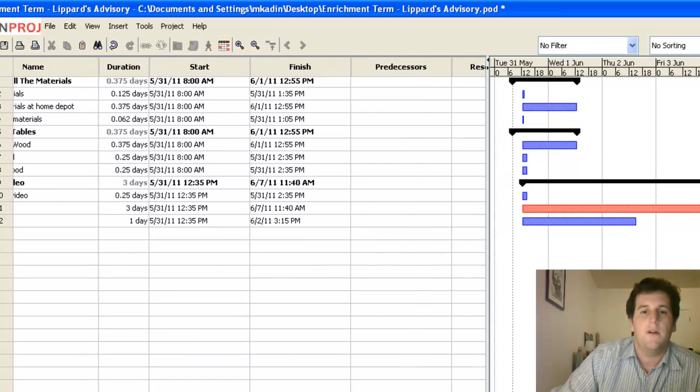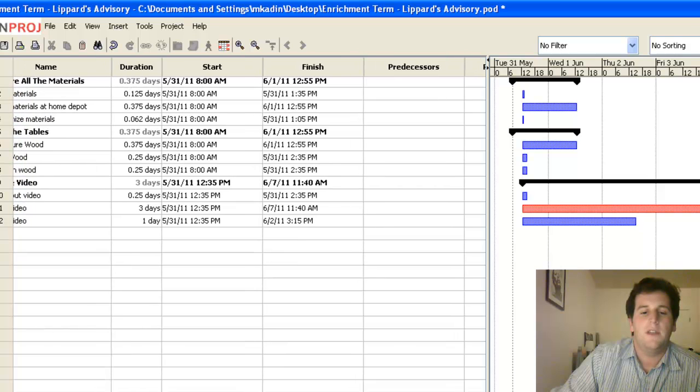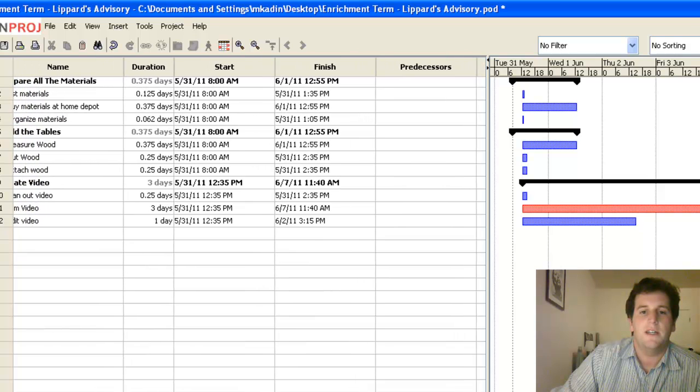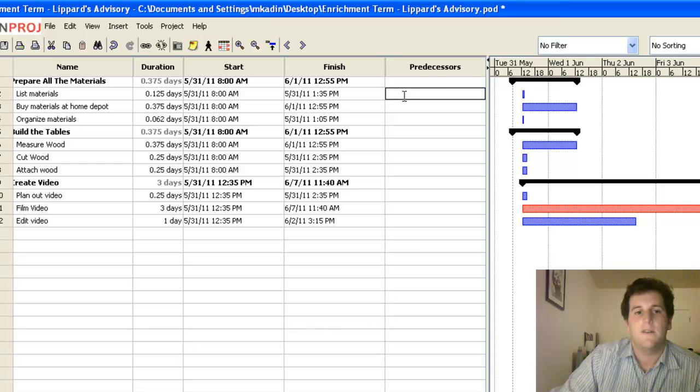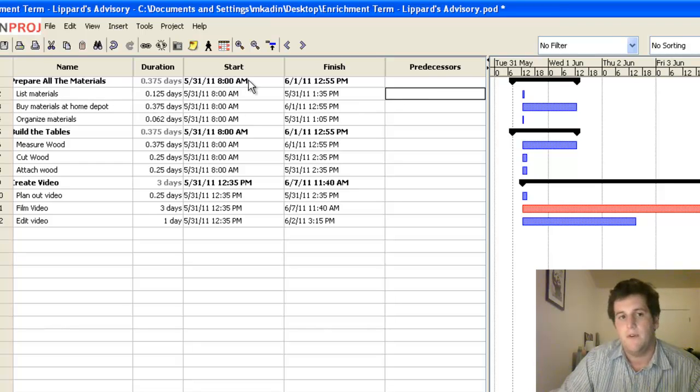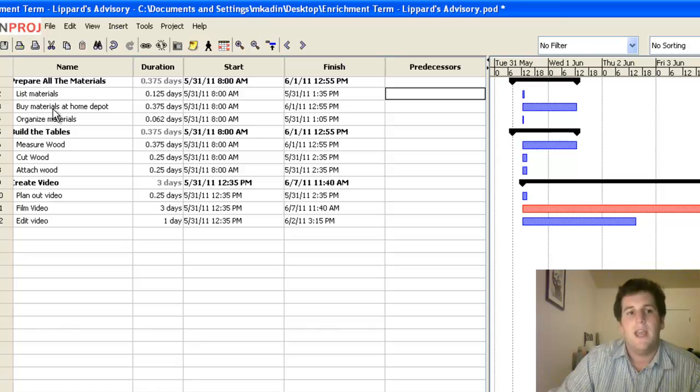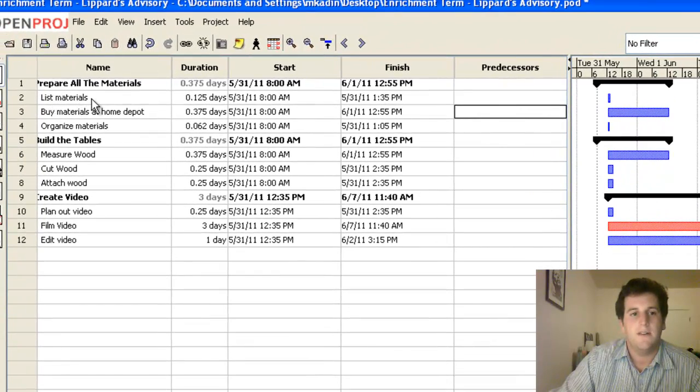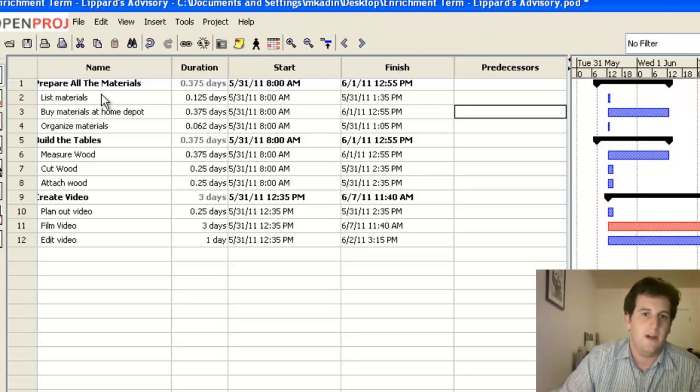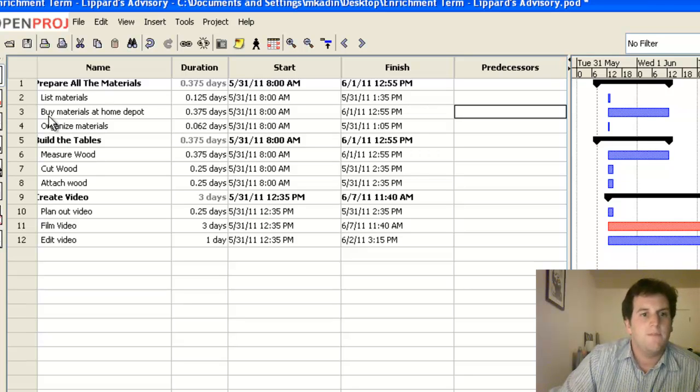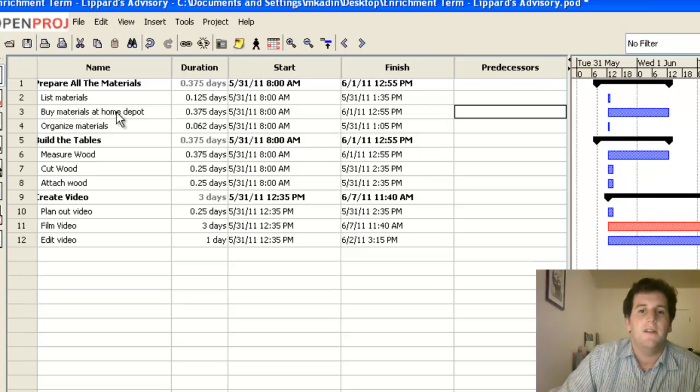And that will tell the computer what things need to happen before this piece of the project is done. So for example, listing the materials doesn't really need anything else to happen beforehand. But we can't buy the materials at Home Depot until listing the materials is done, because then we won't know what to buy. Which means that number two, listing materials, is a predecessor to buying the materials.